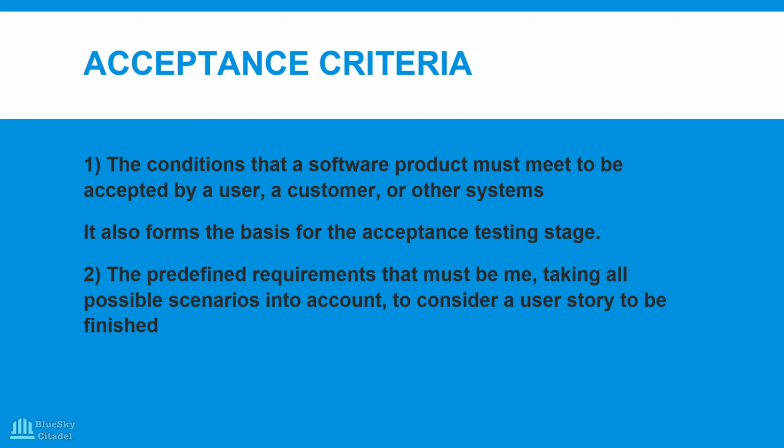So a user story without acceptance criteria is like a wish list. I don't know if we understand. Because how are you going to achieve gold? How are you going to make Nigeria great again? That brings us nicely to the acceptance criteria, because the acceptance criteria shows you the steps that you need to take that will ensure that that user story is completely developed.